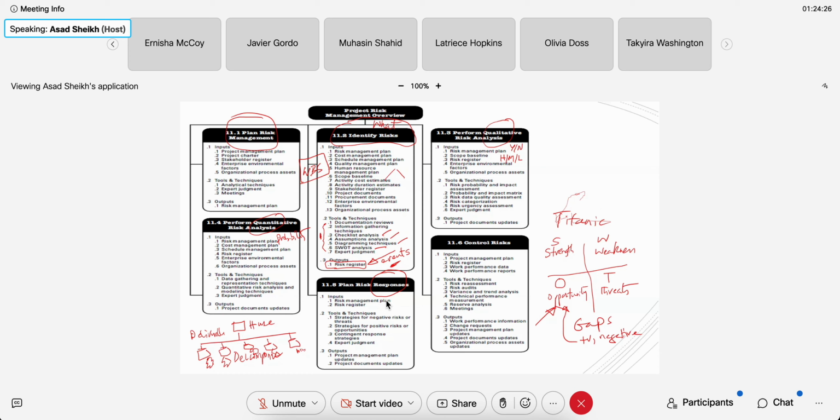We control the risk by giving somebody ownership of this risk. We can say, Tom, you are the analyst on our team. I'm going to make you the owner of this risk register. Your job is, every week you look at the risk register and make sure that none of those risks are going to happen. Just make sure.